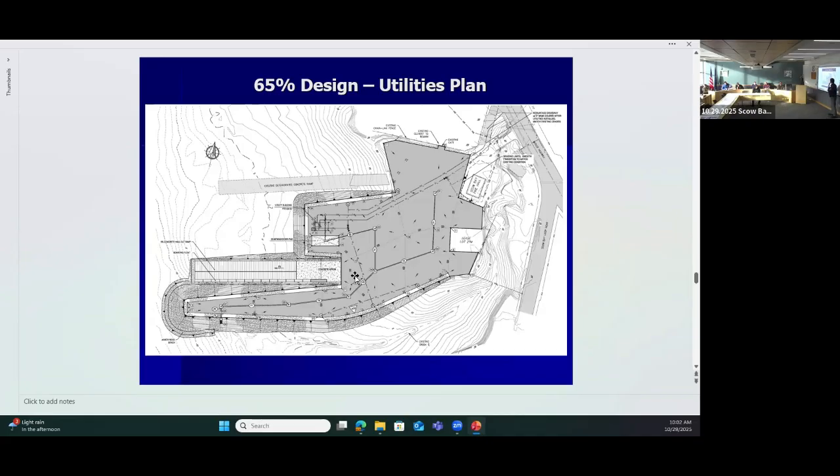Other than that, I mean, we are saddened to lose this spot. They have it being graded sometime in the next year. That's going to necessitate the removal of the burn tower. Currently, that is not budgeted for at all in either the municipal budget or in these plans. And so I would include that as an excluded cost right now. That building, the footing of it is actually concreted in, the big I-beams that hold that whole building up. So you're going to have to chip up all that concrete just to be able to get the building out of there. The connexes, of course, it's easy to move a connex, but that building you're going to find difficulty in.